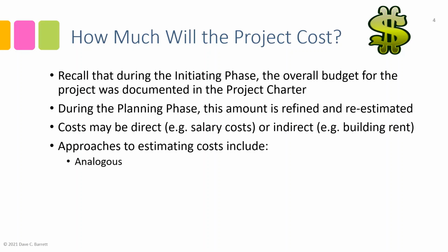And then what we can do is say, okay, well, if that project, which is kind of like the one we're doing, cost X, then our project, all things being equal, will be somewhat similar to X. Might be a little bit more, might be a little bit less, depending upon any differences that might exist between them. But it's a way we can compare back to a previous project. It's really benefiting from the experience of past work, to help us come up with an estimate of costs. Now, that's one way.